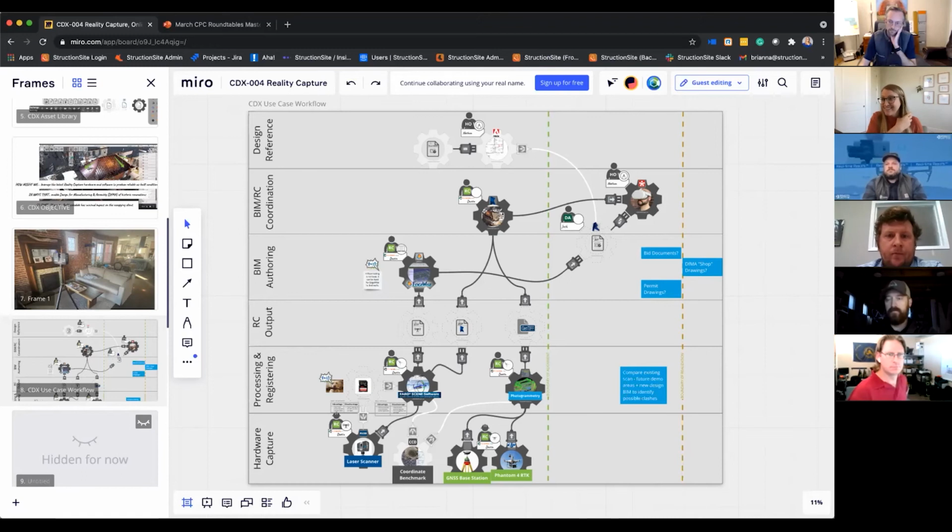Yeah. That was in the case of floor flatness tests, where we'll do a scan and provide an analysis of the floor and then provide that to our flooring subs. And then some of them are like, oh, this is great, thanks for sharing. And then others are like, well, we can't trust this for liability purposes. And then they have to go do their own anyways. Yeah. And it's like, we trust you, but we don't trust you.